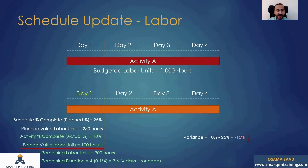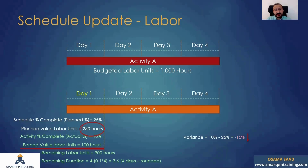The budget labor units are calculated based on duration and number of resources. What if your plan is 10 laborers, but you had 15 on site? You might think you're on track, but maybe you didn't hire skilled laborers, there's lack of supervision, or laborers aren't achieving the required productivity. It can happen that although the planned manpower is 10 and you assigned 15, you are still in delay. So the actual manpower doesn't factor into the earned value model.